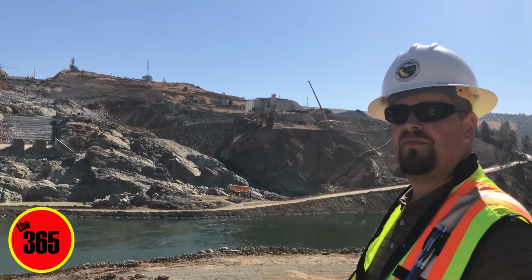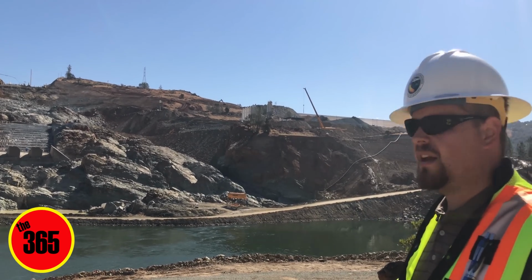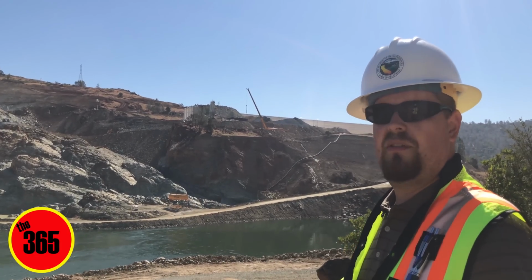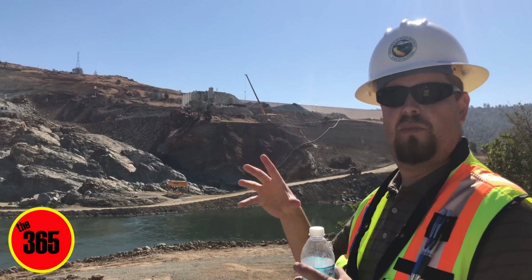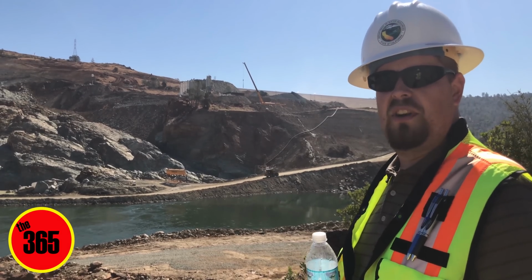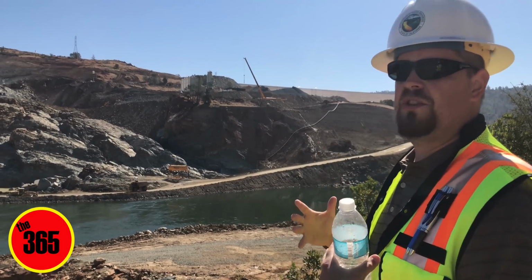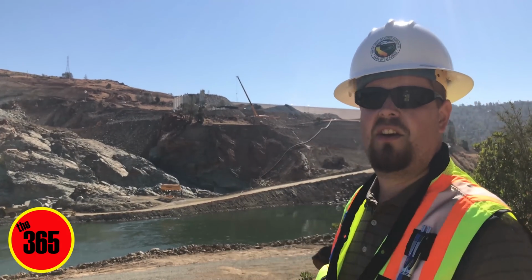And you were telling me earlier about how many hours it took to put both those plants in? Yeah, so the plant at the top is actually a refrigerated plant, and they have a very specific temperature requirement that we have at delivering the concrete. And so that's a really complicated plant. We'll get some shots of it. You'll be able to see it and zoom in up on the top. But that one was over 5,000 hours of work that was put into that from labor. And this plant up here is another 3,000 plus hours also. So that's part of what Kiewit has been doing. We weren't building, we were demolishing. We're creating all these access points because they need to be able to get in here to meet our timeline.